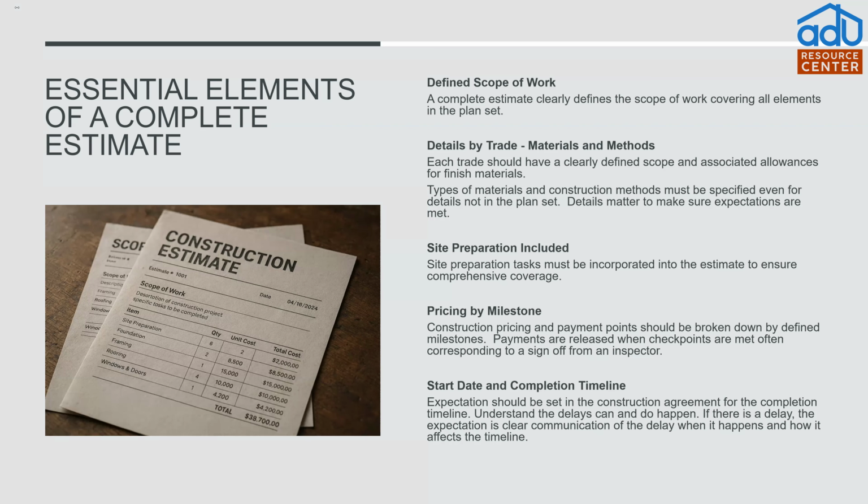Those details should also be broken down clearly by trade. So you're going to see in the demolition what is all included, and that it includes the dumpster and everything to haul out and grade the project before starting the framing.